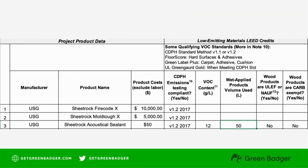Looking back at the LEED cover sheet, the first two products are wall products, so we need to include an emission certificate that meets the CDPH standard. The sealant falls into the adhesives and sealants category, so this also needs to meet the compliance requirements. For the sealant, we need an emission certificate and we need to show the VOC content. VOC content can be found in an MSDS sheet, a product data sheet, or lab certificate.